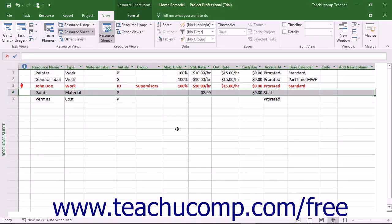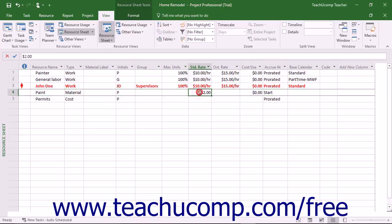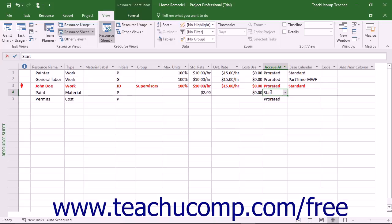You can assign material resources to tasks to note project costs associated with the use or consumption of a material resource to accomplish a task. Remember that material resources do not perform any work. Therefore, assigning material resources to a task will not change task durations in the way work resource assignment does.